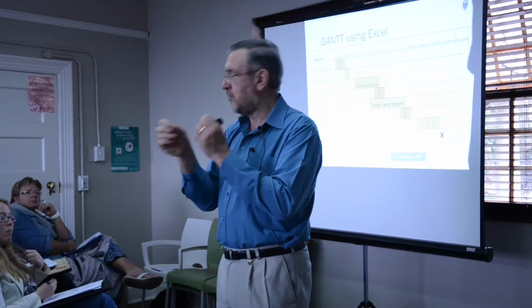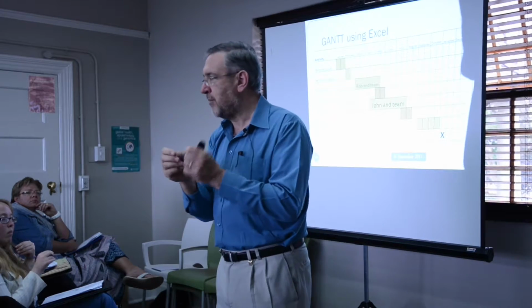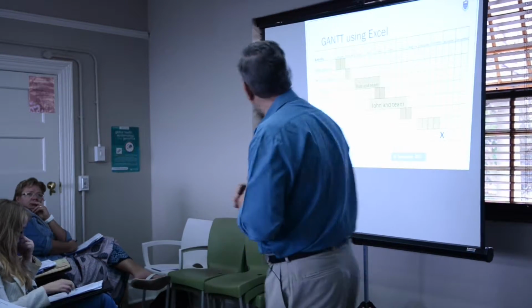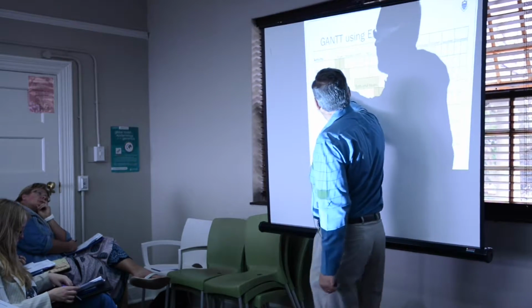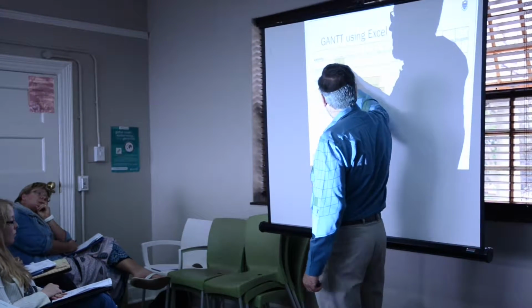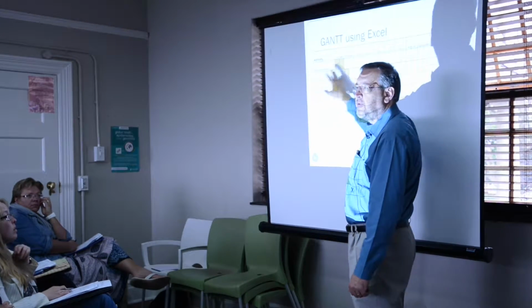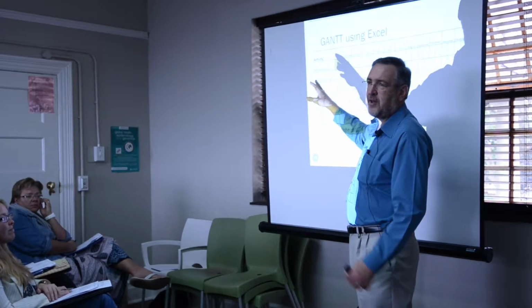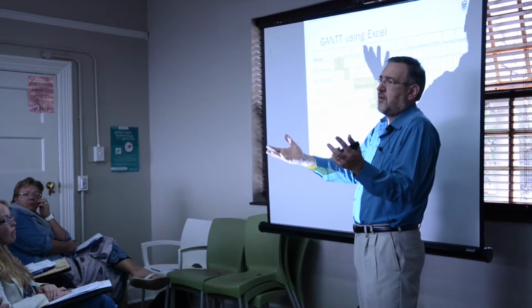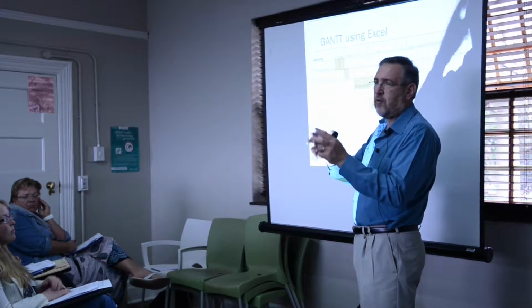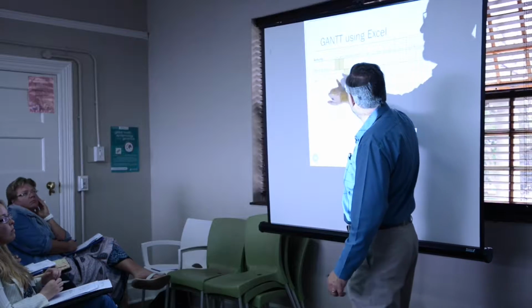So objective 1, synthesize the material. Activity 1, do the reaction or blend the material or whatever it would be. Each of the steps you would break down. So objective 1, blend the material. How long will it take? I've done this in months. You could do it in quarters, depending how long your project. If it's a 5-year project, you would do it, say, in quarters. 4 quarters in a year, something like that.